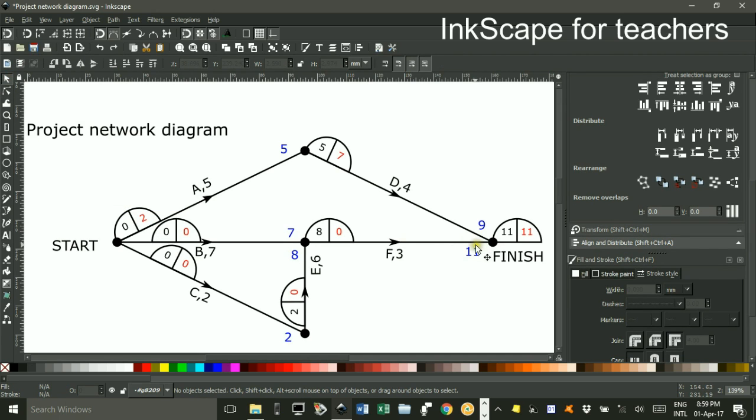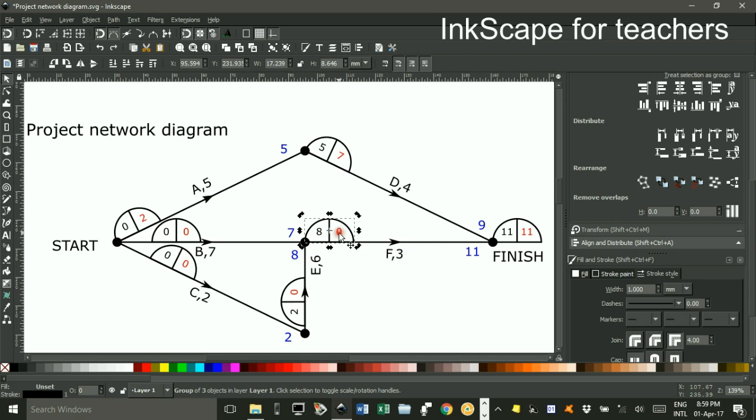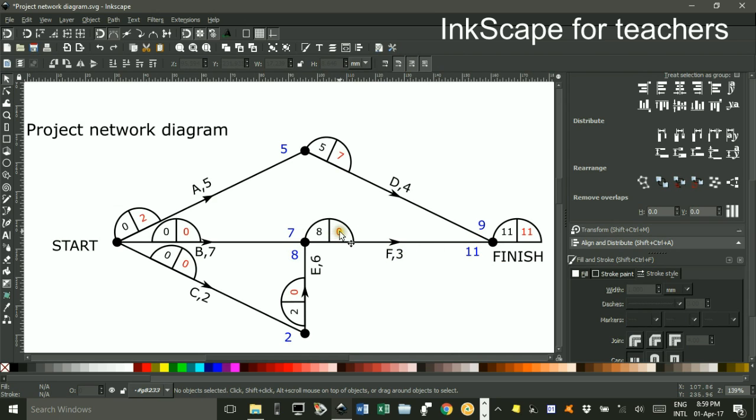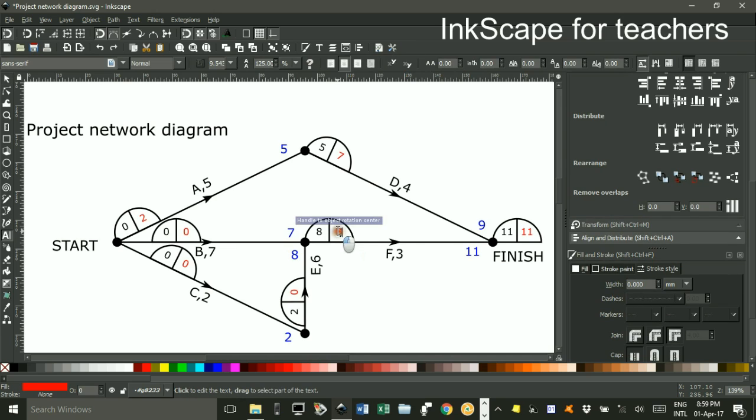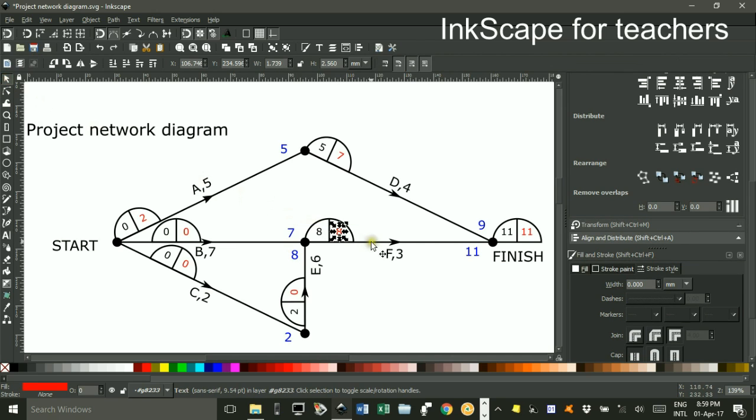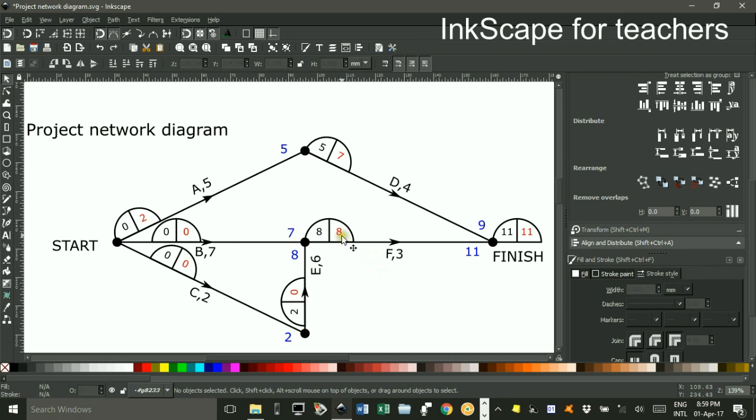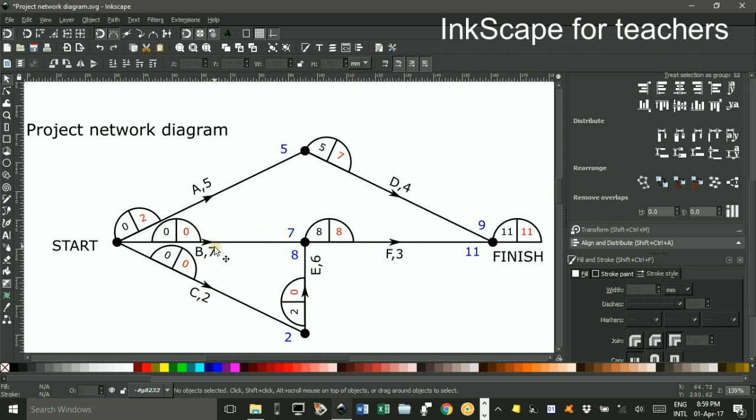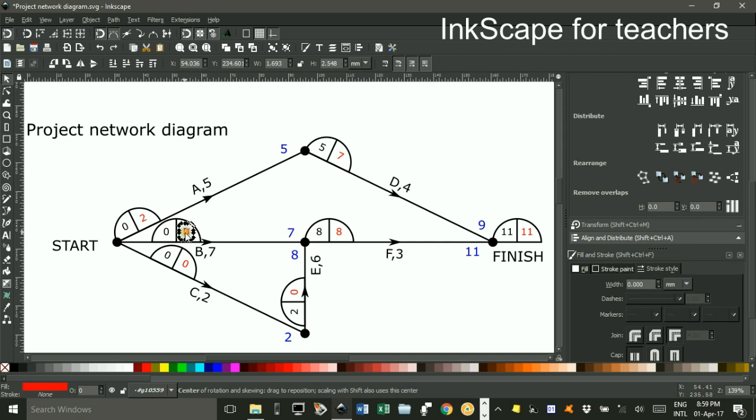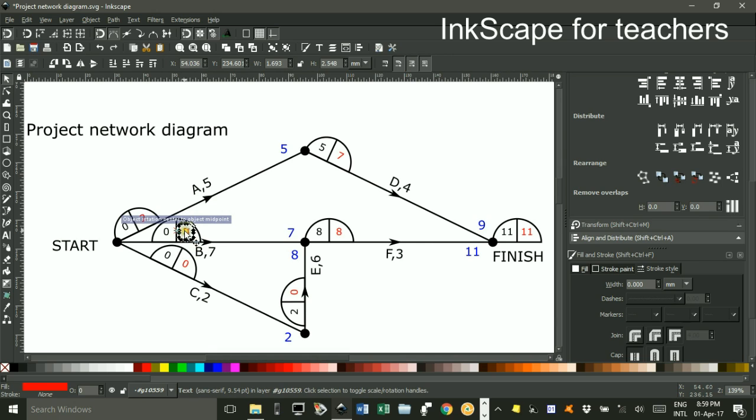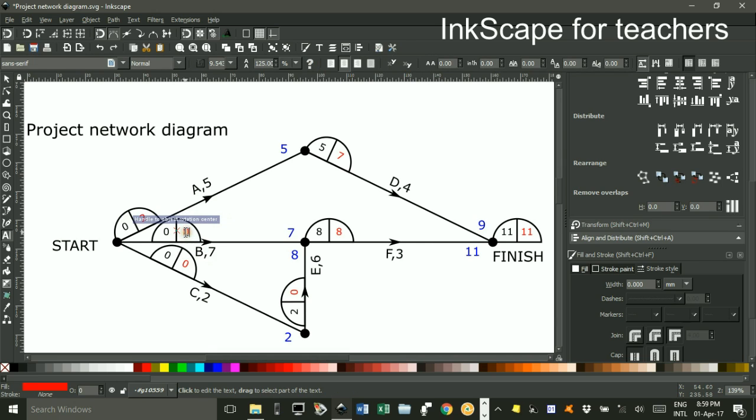Going back this way, 11 take 3 is 8. Make that 8. 8 take 7, the duration, is 1. So I'll make that 1.